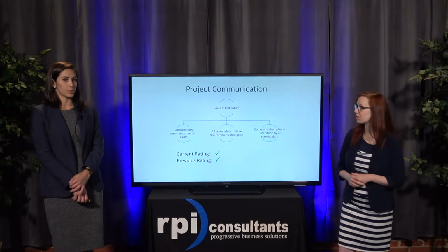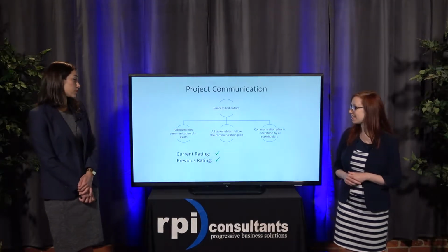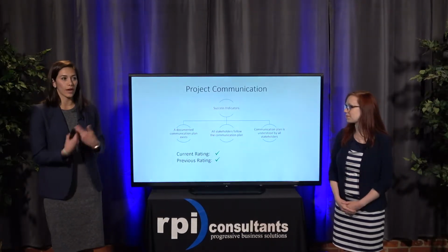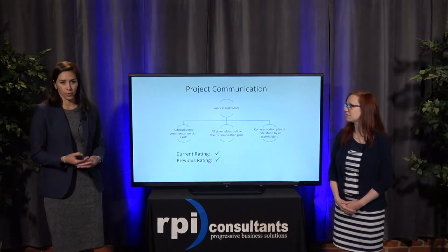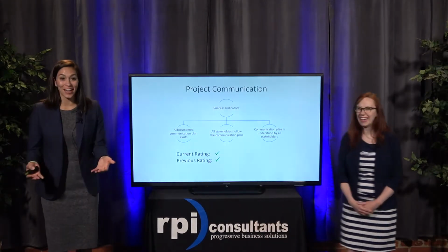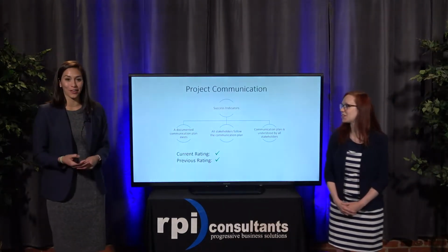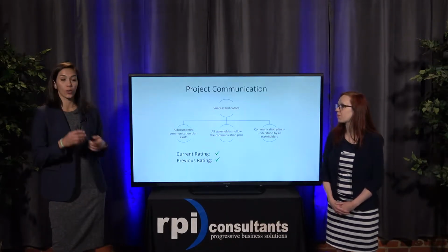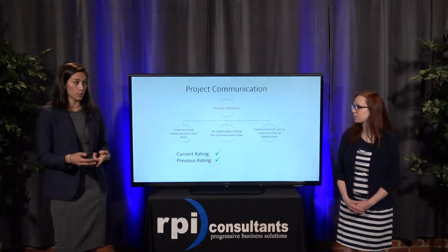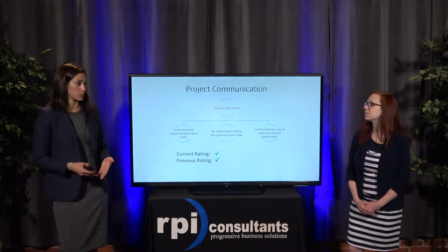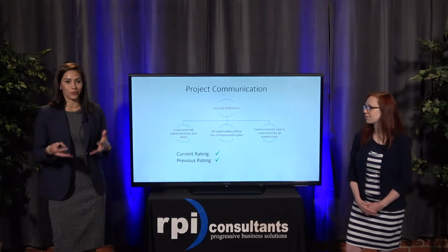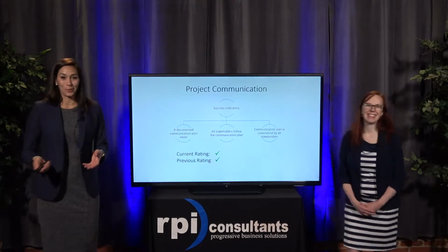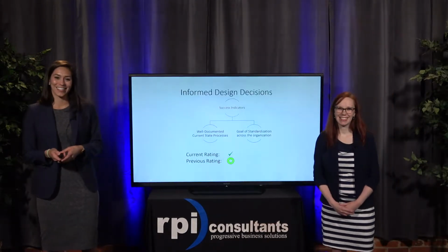And real quick, just off script here, it just popped into my head, but a communication plan is, when I first heard of it, I thought, well, this might be a little bit overkill, but then I actually looked at what Teresa had put together, and I think it makes a lot of sense. What it actually means is, we're going to meet this many times per month or per week, and this is what we're going to talk about in each one of those meetings. So in case you weren't familiar with what that was or aren't a believer, you should be one.